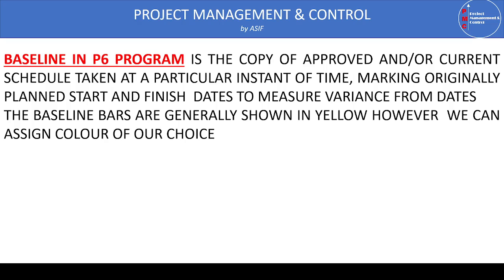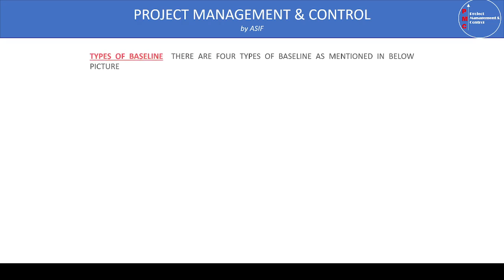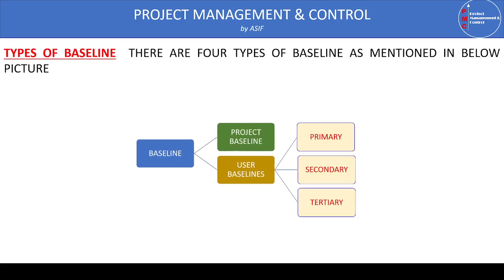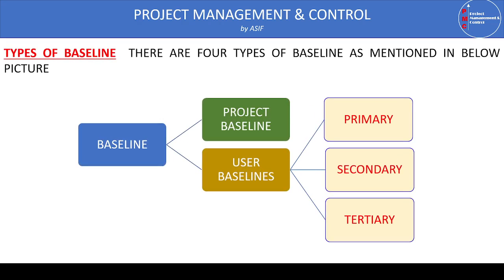Now let's look at the types of baseline programs. There are two major types: the project baseline and the user-defined baseline. The project baseline has no further divisions, but the user-defined baseline can be further divided into three types: the primary baseline, secondary baseline, and tertiary baseline. All of these baselines have their own special features.